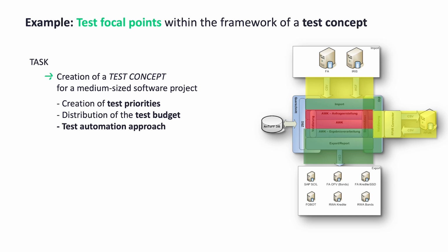To reduce the risks, test automation was implemented that not only checks the implemented rules in isolation, but also always in conjunction with all other rules already implemented. The automation was based on sample portfolios for which the specialist department manually calculated the expected valuation results. Each time a rule was changed, all sample portfolios were automatically checked. This meant that unwanted side effects could be identified immediately and clarified with the specialist departments.